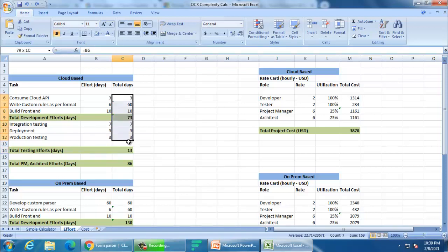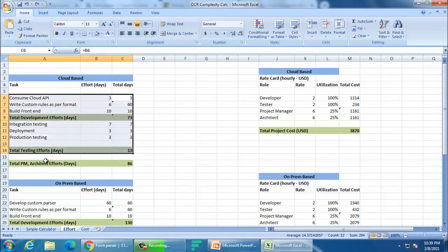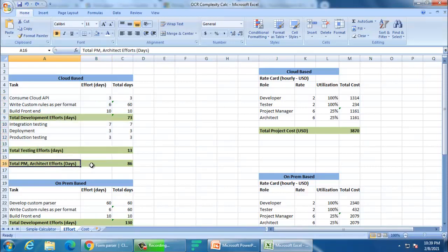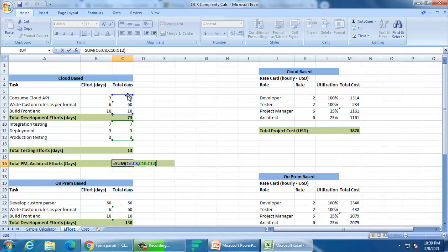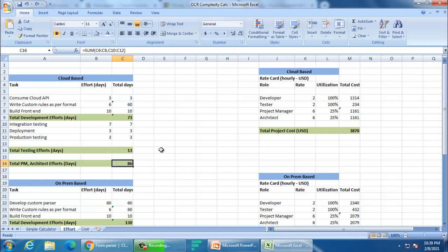After building the back-end and front-end, you need integration testing, deployment, and production testing. Let's say 7 days, 3 days, and 3 days respectively — that's 13 days for deployment and testing. These are your testers and developers. You also need to put extra people there, such as an architect and a project manager, who will be present from end to end although they may not be 100% occupied.